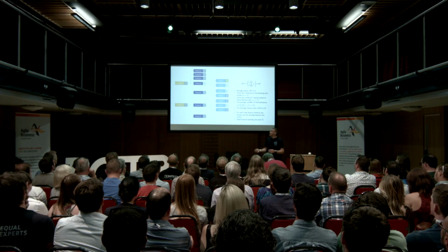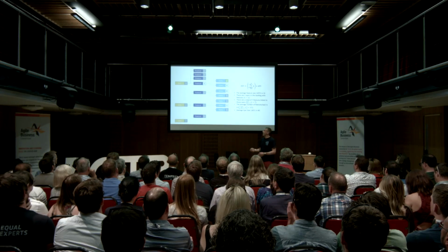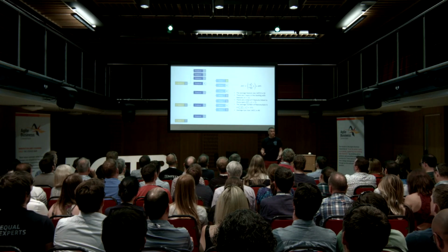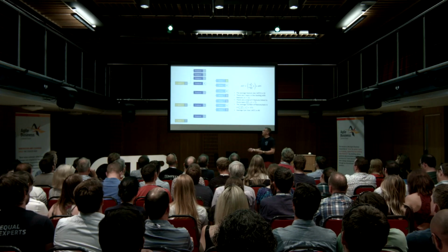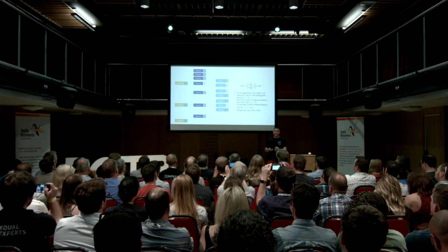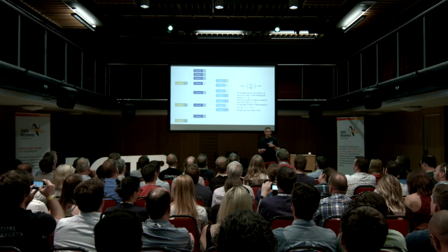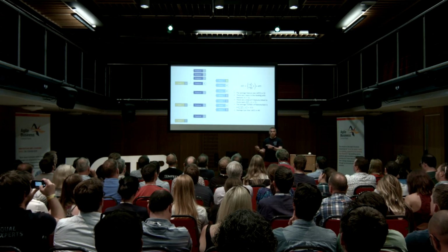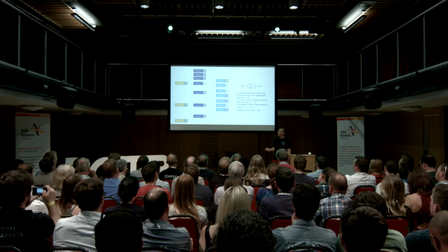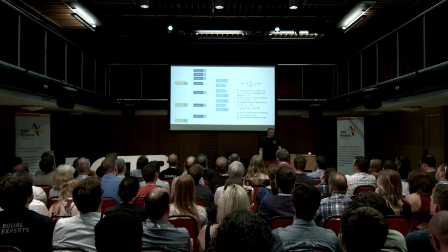So if we did that and added in another epic, we want to know how big an epic is. And the process for working out how big an epic is is the same process we did for features. We look at the number of epics we've got in the backlog. How many features do each of those have? Work out the average number of features per epic. And then we multiply that by the average feature size. So here we can say our epic is probably about 40 points.